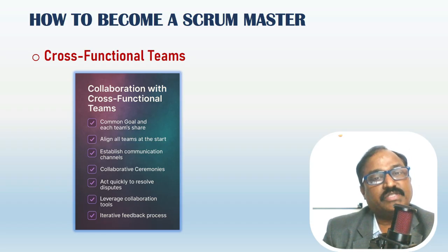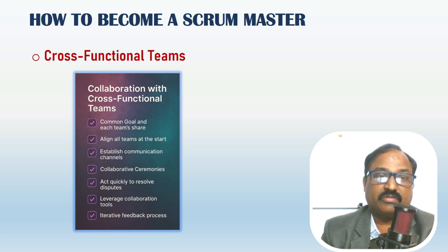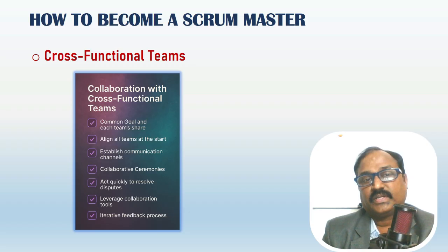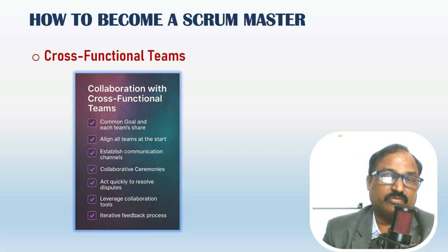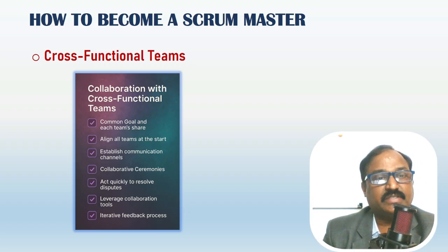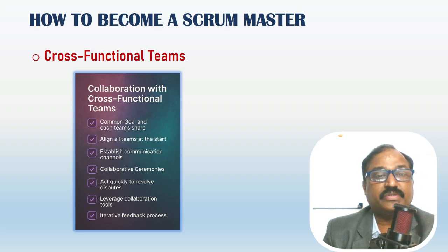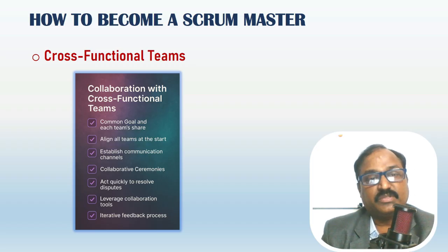Communication is not just a fluency in a language. Having depth-level subject knowledge is a core thing for the better communication. You should communicate the requirements, tasks very clearly. Otherwise, it falls into rework. Rework impacts on deadlines, which impacts on increasing the project budget. That causes to reduce the revenue, thereby reduction in profit margin. So better communication is important.